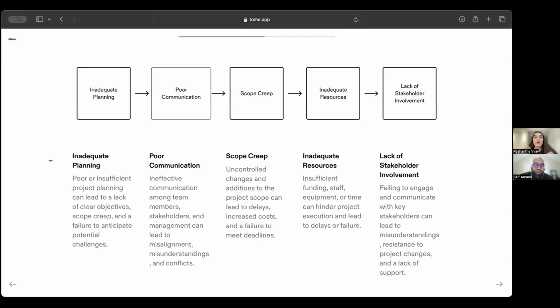And a scope creep, what happens is uncontrolled changes. This is where your change management comes in, folks. And this translates into timeline change, shift change, delays, resource change, right? This bleeds on to inadequate resources. Imagine you had a scope creep or a change in scope, you can see what's happening here. It all ties in together. It's a chain cycle, right?